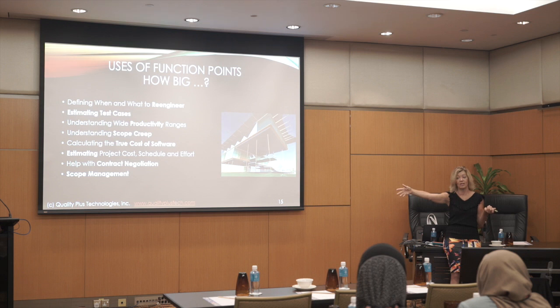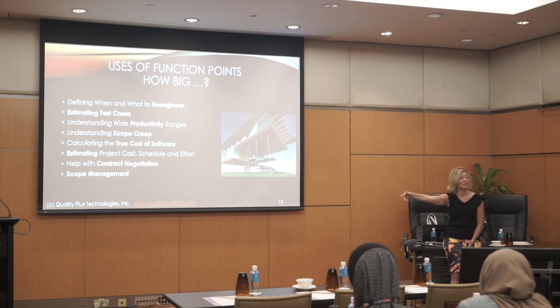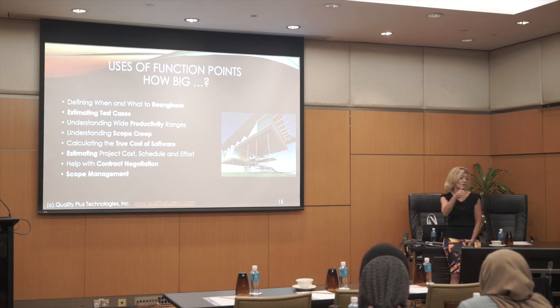But knowing historically that by the time you get to the end of a project, that 1.5% is kind of what happens on projects, maybe what I should do at the beginning of a project is put in 250 as the approximate size, to account for what I know the project will do. I can still use 200 function points, because if management says, show me where you got the 200 function points, I can show them.